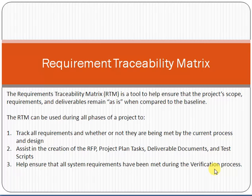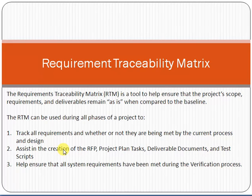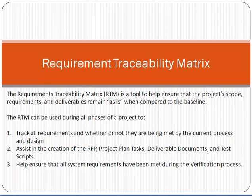The RTM is used to track requirements and assist in the creation of the RFP, project plan, task deliverable documents, and test scripts. It helps ensure that all system requirements have been met during the verification process. Simply put, it is an Excel sheet where you make sure that if there are ten requirements, you deliver exactly those ten — not more, not less.